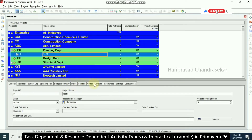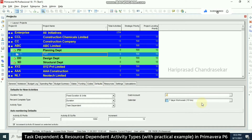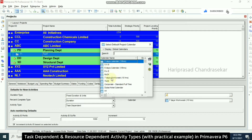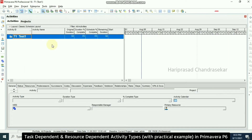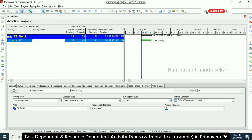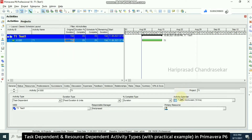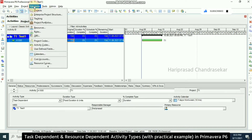From here you can go to default and select the calendar — seven day work week. This is important for this project. Right-click to open the project, and I'm adding just one activity, T1, with a duration of 10 days. The activity calendar is set to seven days work week, every day 10 hours.